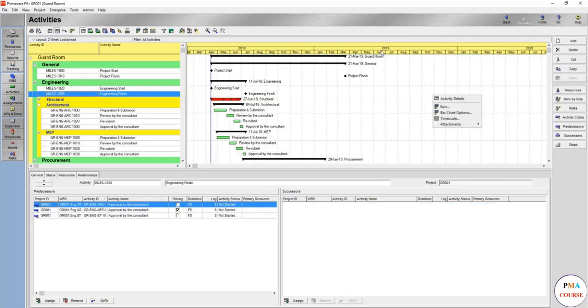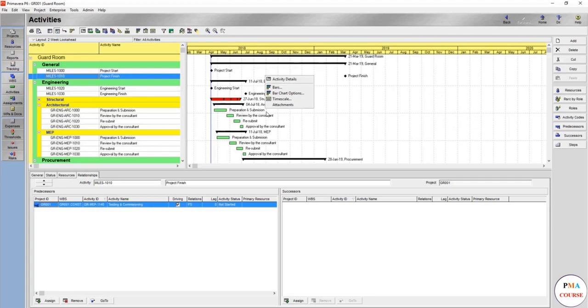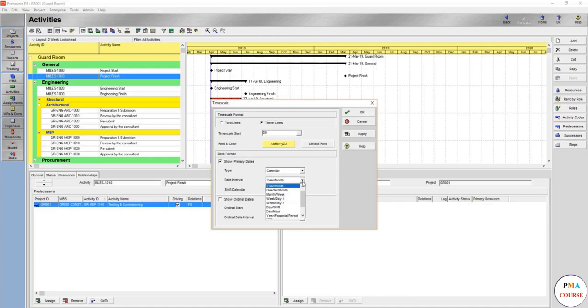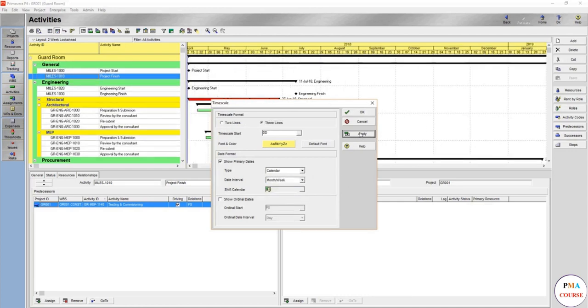So what do you want to see? Let's say we want to see year, month, and weeks. This can be shown in this way. Go to time scale and you would make it month, week. You'll see automatically it has changed to year above, month, then week.